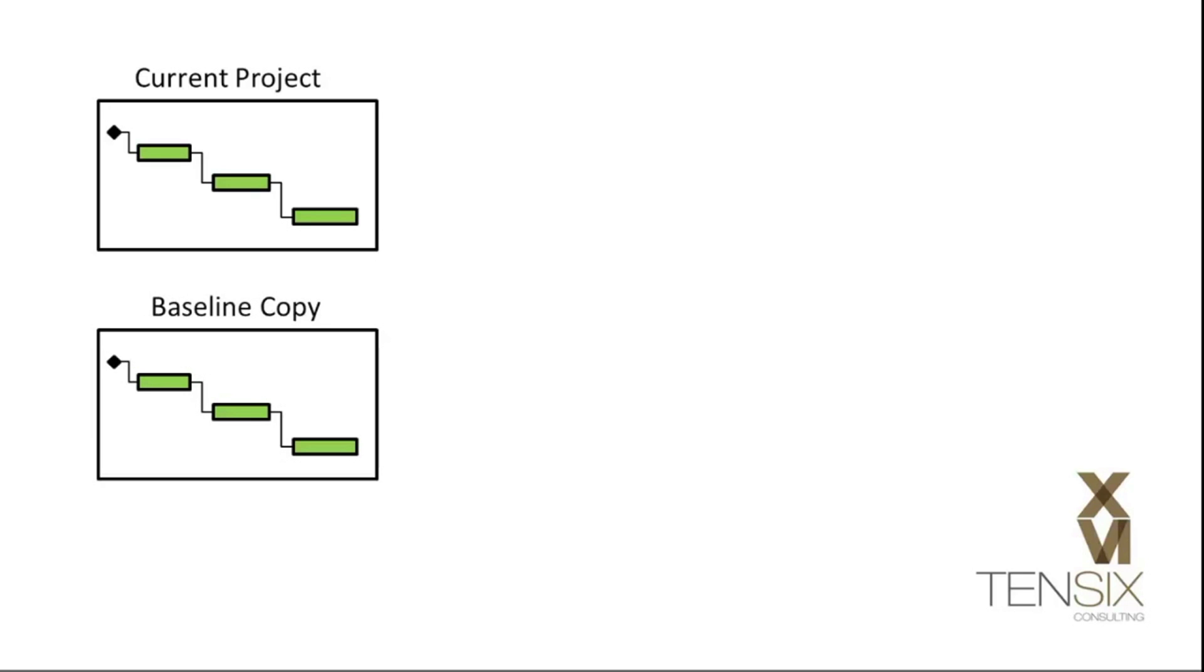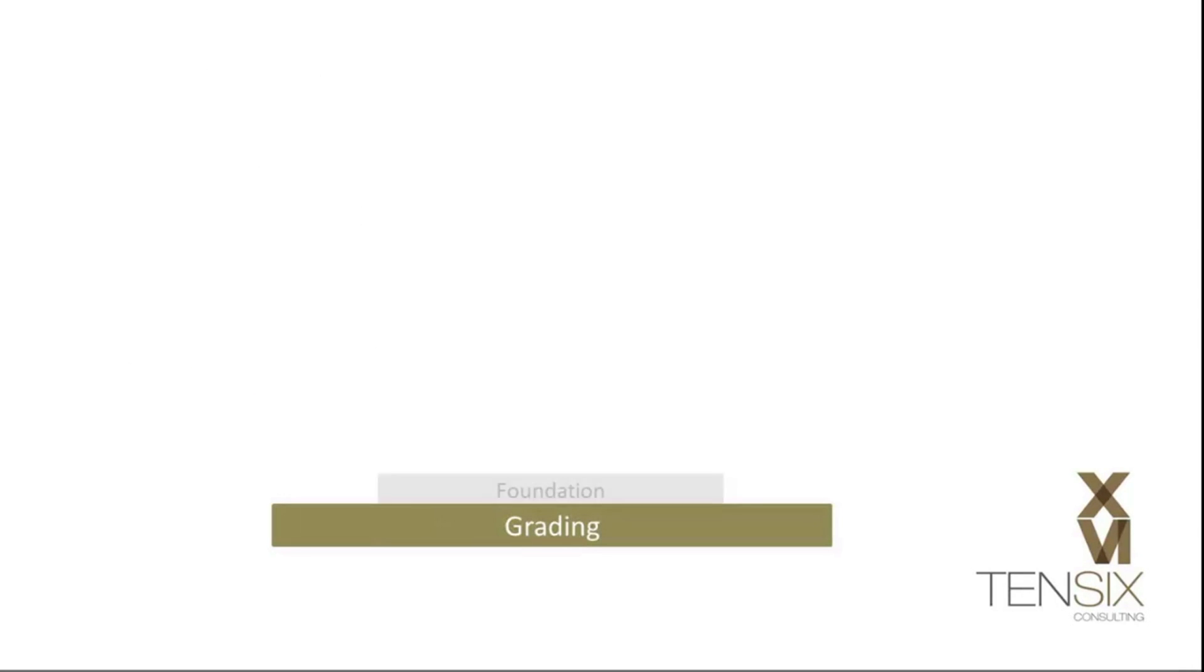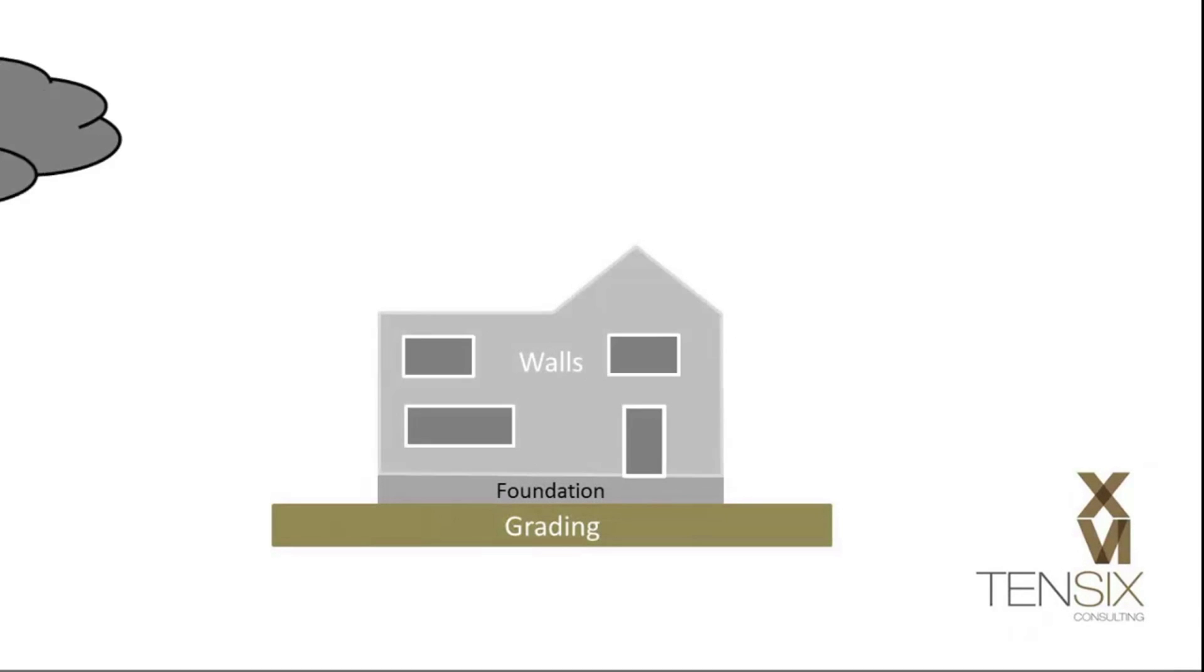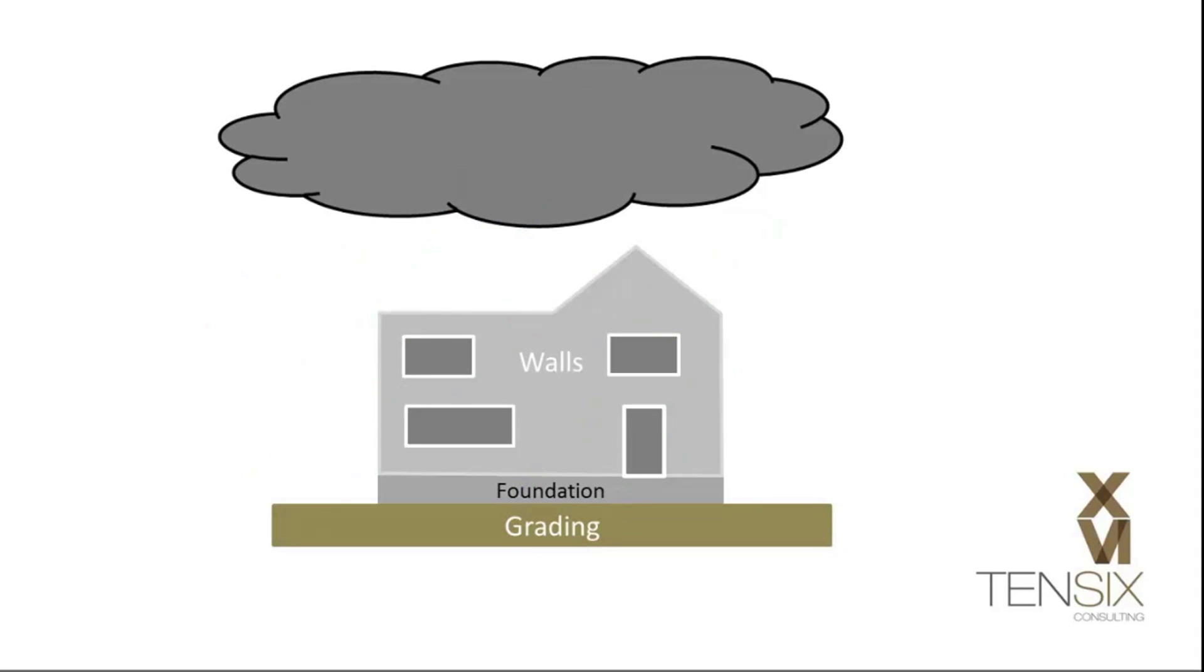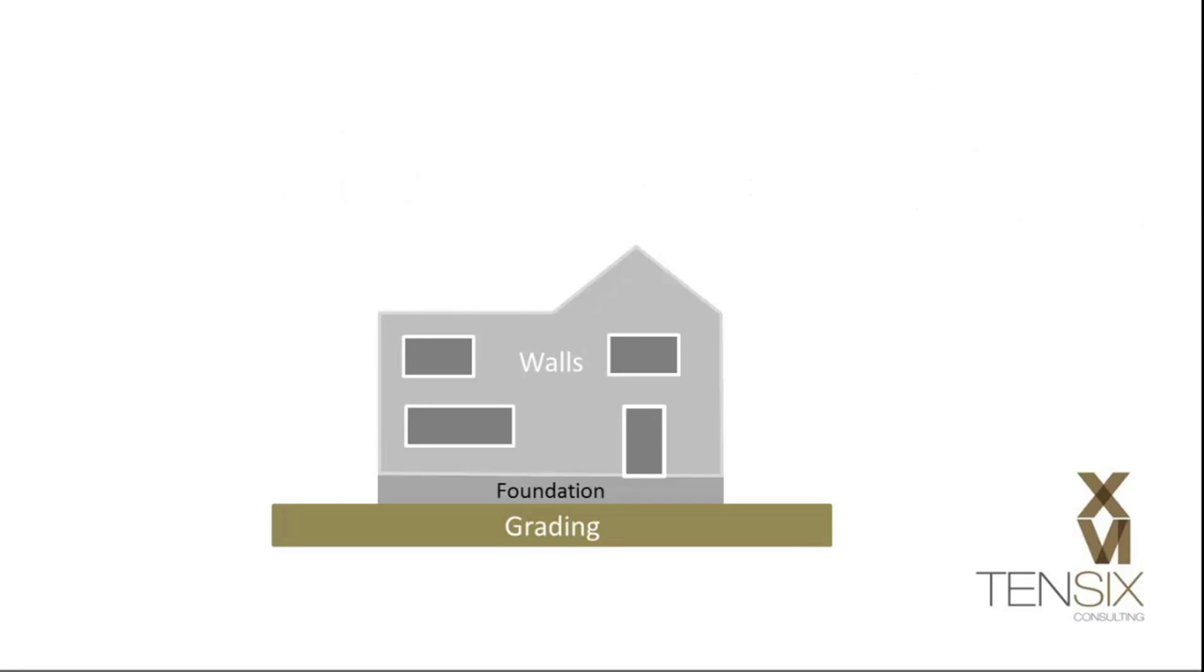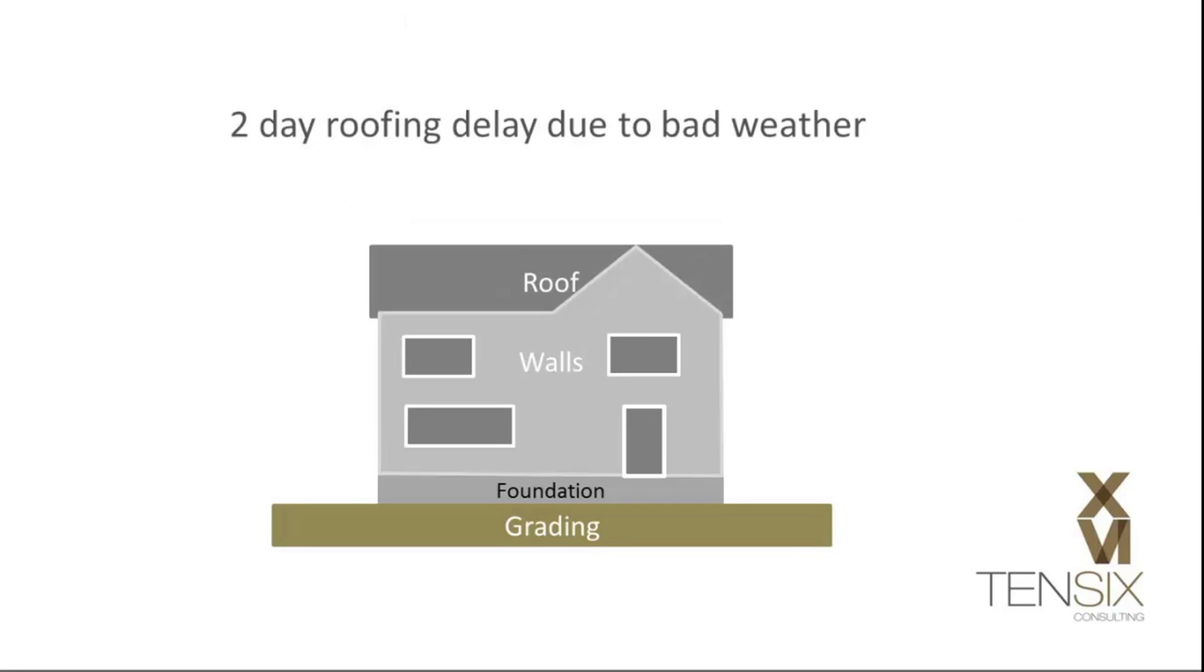Without a baseline, it is virtually impossible to see if your project is proceeding to plan or not. Because projects rarely go exactly as planned, it's vital that you identify any deviation from the original plan and act quickly to get the project back on track. A baseline will help you do this.